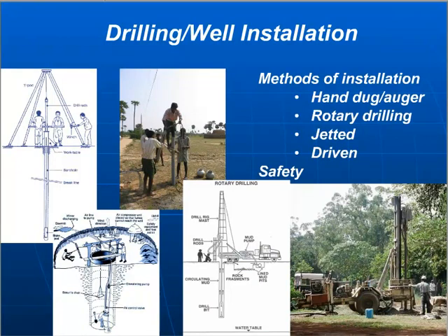So you have to decide as a chapter if you can afford to drill a well and make a change in your project if you find out that you can't get the quantity and quality you need, and you need to go through a different source. You need to at least be prepared for that consequence no matter how much you're doing to try and prevent that situation.